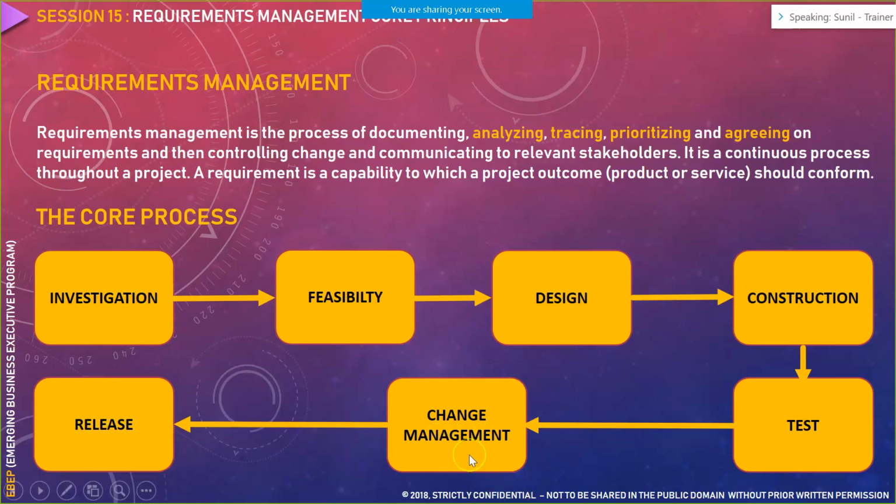Now, in between, if there are any new requirements coming in, then we have a change management process in place. If it is doable, we would deliver them in this particular release. If it is not doable, if the size of the requirement is too huge or too large, then we will postpone it to the very immediate next release.